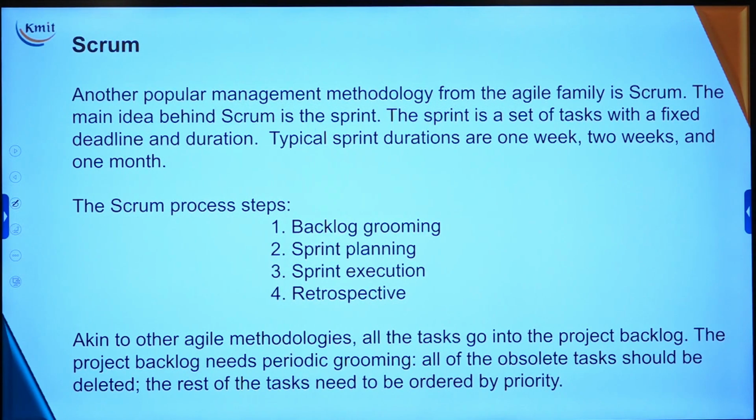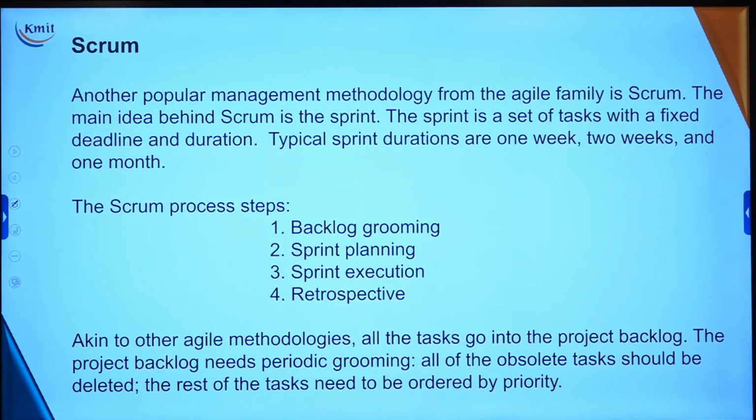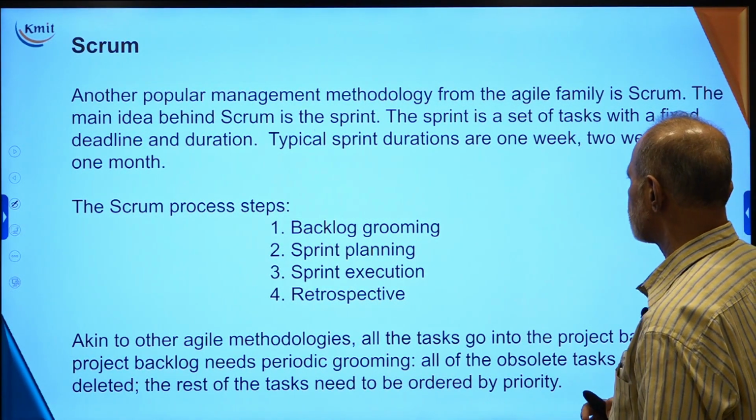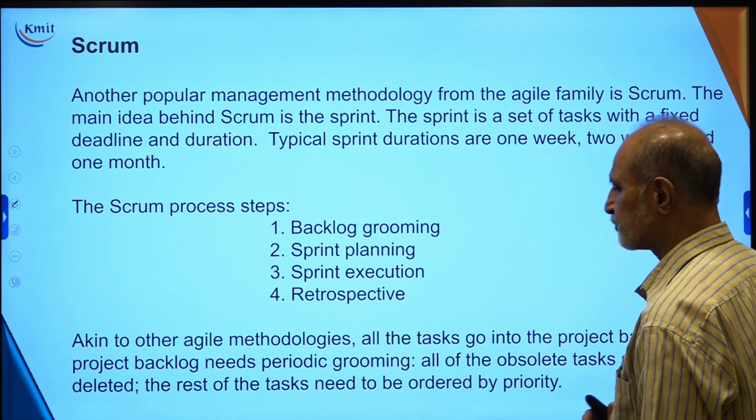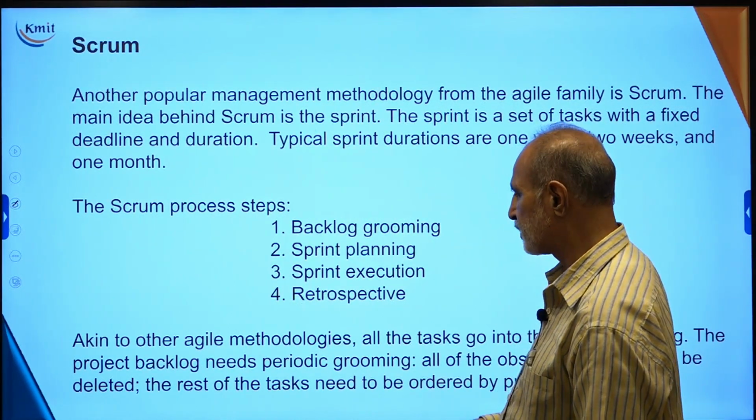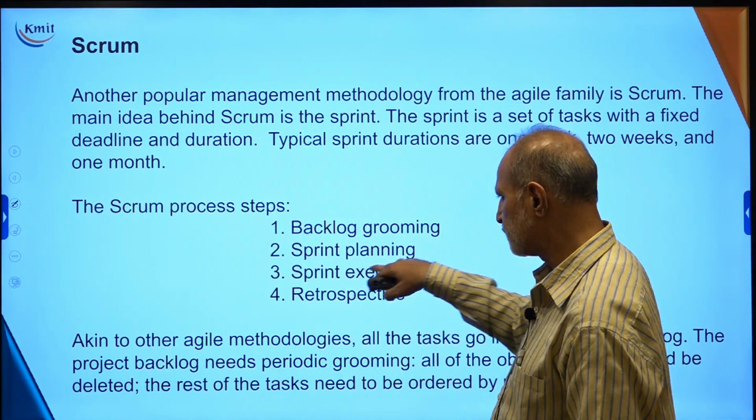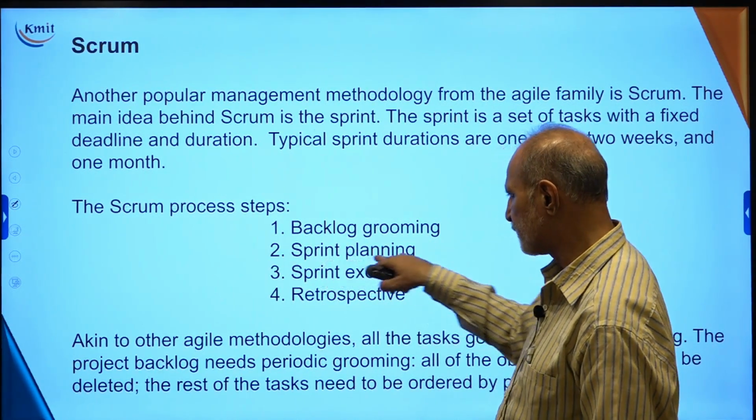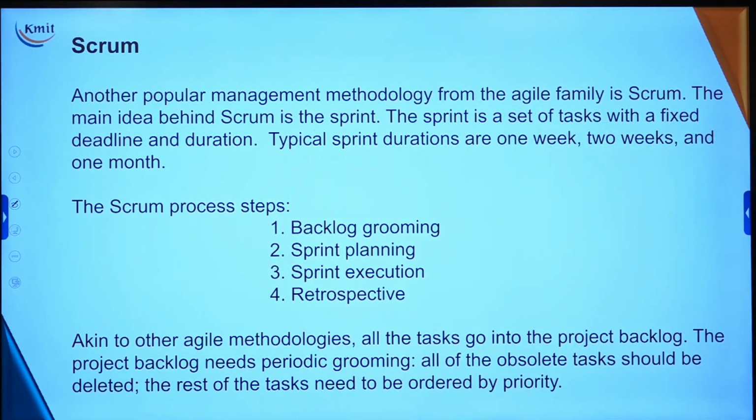So the sprint is a set of tasks with a fixed deadline and duration. Typical sprint durations are 1 week, 2 weeks and sometimes maybe 1 month. So Scrum processes are backlog grooming, sprint planning, sprint execution and retrospective. That means I have to go back and try to find out what was the problem.